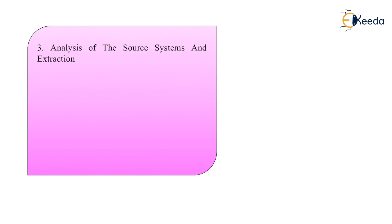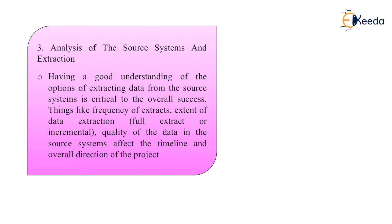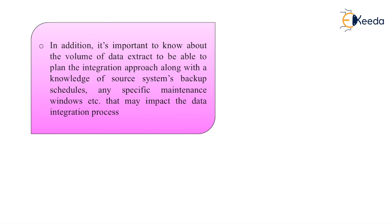Third is analysis of the source system and extraction, which is a main point for data integration. Having a good understanding of options for extracting data from the source system is critical to overall success. Things like frequency of extraction, extent of data extraction, and quality of data in the source system affect the timeline and overall direction of the project. It is also important to know the volume of data to be extracted to plan the data integration approach, along with knowledge of source system backup schedules and any specific maintenance windows that may impact the process. These are the challenges you will face while performing data integration and working with various data integration techniques.